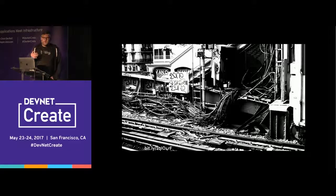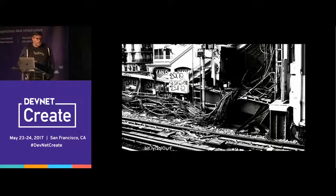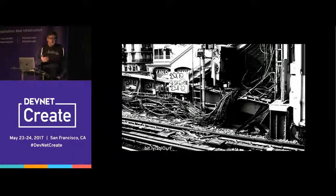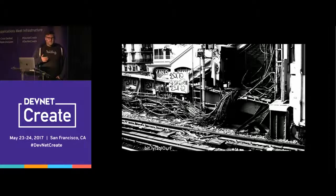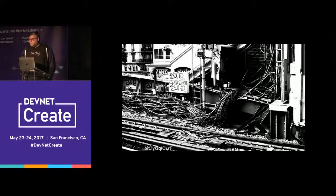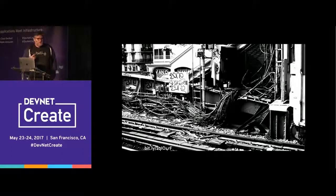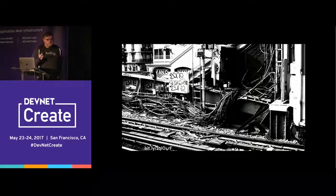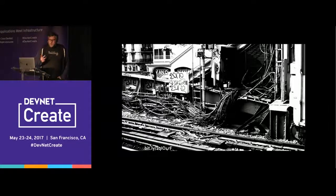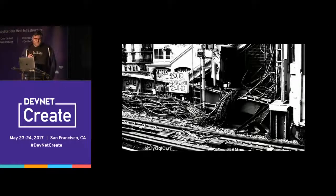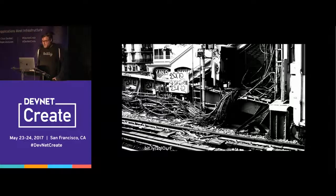Even for the things you are familiar with, you have to make sure you know what the current capacity and performance bottlenecks for those systems are, because when you're trying to understand what a system might look like in a new environment, you really need to know its exact characteristics. Additionally, identify any specialized needs you have to vet with potential vendors. Some examples for us: we needed Layer 4 DDoS protection — a lot of vendors want to do Layer 7, and that knocked out a lot of options. We have our own slash-24 IPv4 block we needed to bring along, which adds complications. And we have core systems designed for the cost-performance ratios of spinning rust hard drives — another thing we had to figure out.